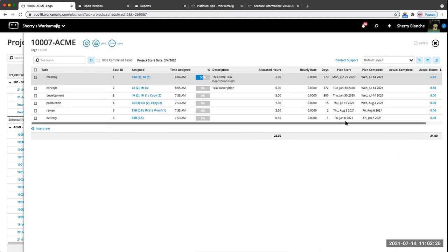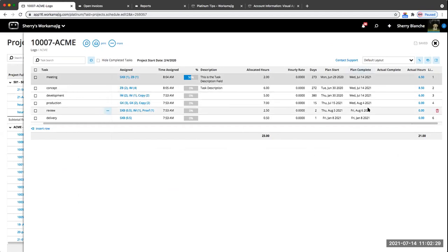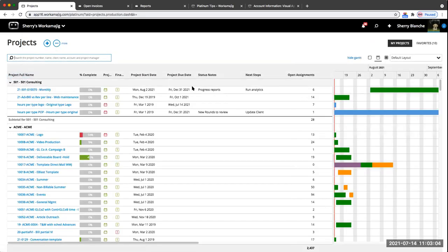But what it's really saying is I have a due date, and based on when the project, if I have a project due date or I have a specific task constraint that something has to be done on a certain date, then it's telling us that it's overdue, getting close to being overdue, or the actual date that the task was worked on is outside of the actual constraint that I gave it. Now, there's a lot of things related to the task turning. If it's green, it means it's still on track. I picked a bad example because I have no project due date on one of those.